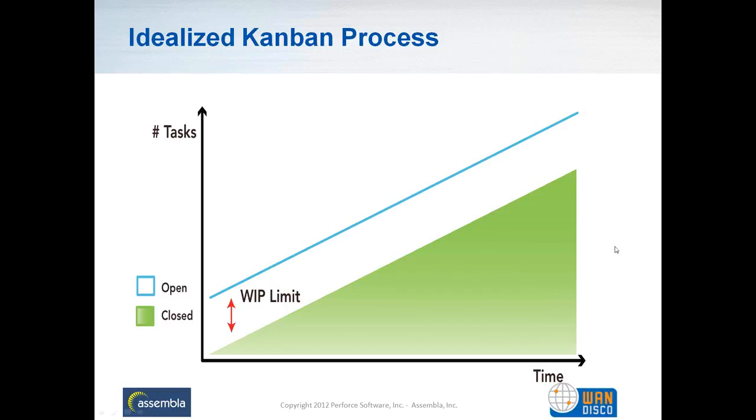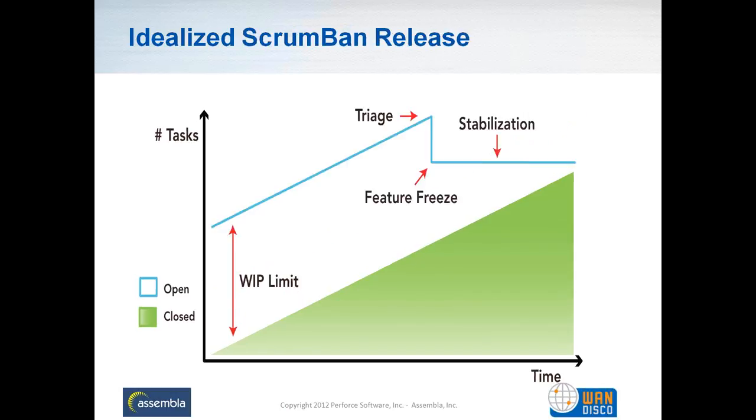And this is a very clever system, this Kanban system, because it forces you to finish each task as quickly as possible. The problem is most people don't have a continuous process. They release iterations. They have a release process. So for those people, we can adapt the Kanban process into something I'll call scrum-ban. So you can work with a distributed team and skip that iteration plan and just grab off the work in progress that you're going to work on at the beginning and use this Kanban-style process.